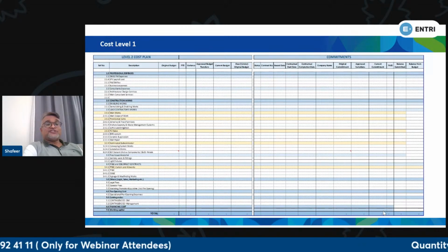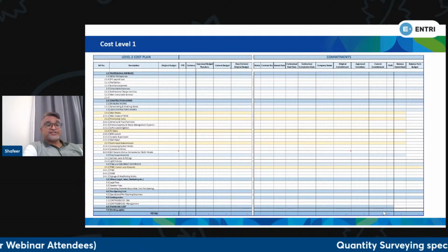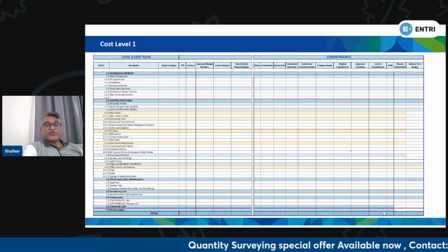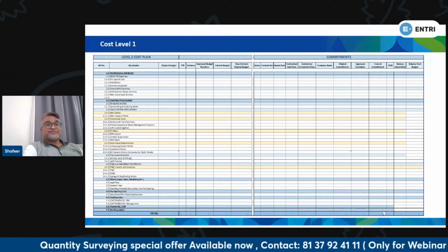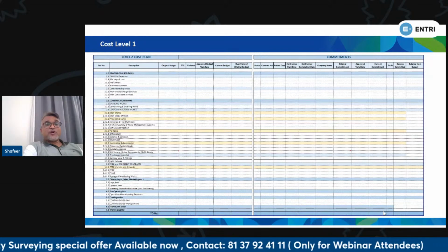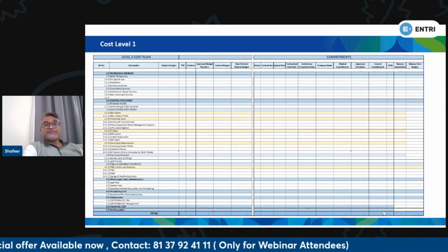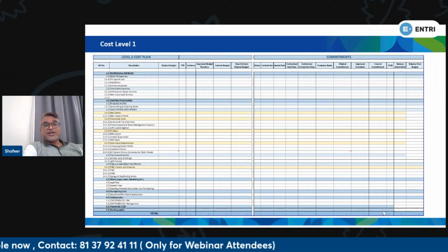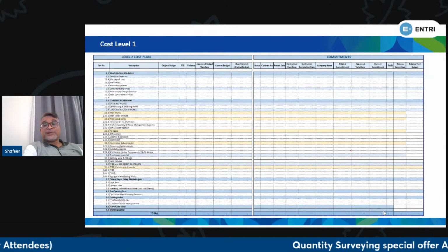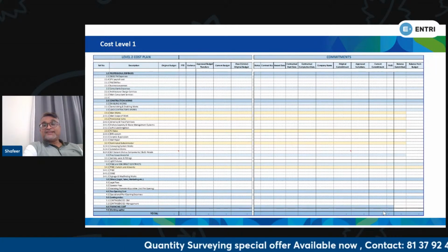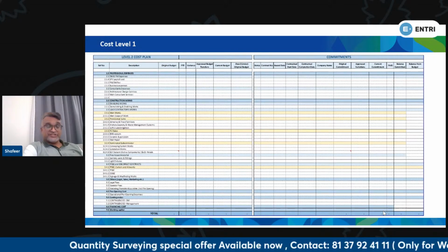And in the horizontal, you can see the original budget, PTE, that means the pre-tender estimate given by the cost consultant, the variance, approved budget transfer, current budget, and over or under original budget. Then we have the commitment status: contract number, awarded date, contractual start date, contractual completion date, company name, original commitment, approved variations, current commitments, paid, balance committed, and balance from budget.